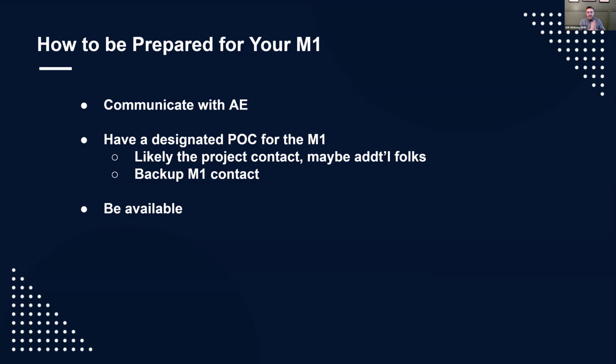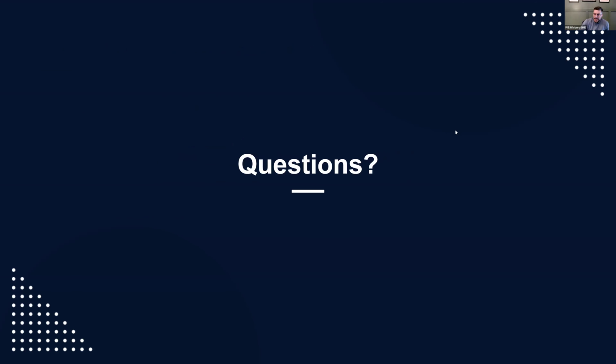So it's better just to actually test when you get the M1 and then approve it. Because once you approve it, we can say, well, you approved it. What do you want me to do now? I mean, you said this is it. So we're kind of clean. But anyway, not trying to be negative, but just keep that in mind. Test what you're receiving to make sure your system ingests it correctly and your people say it works. So that's that. That's it.